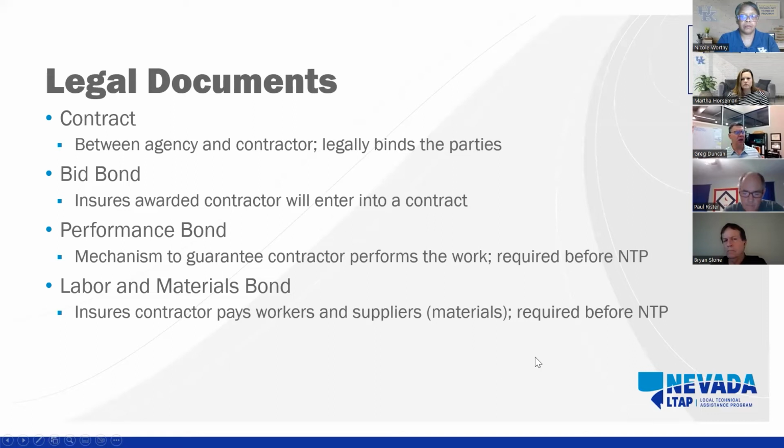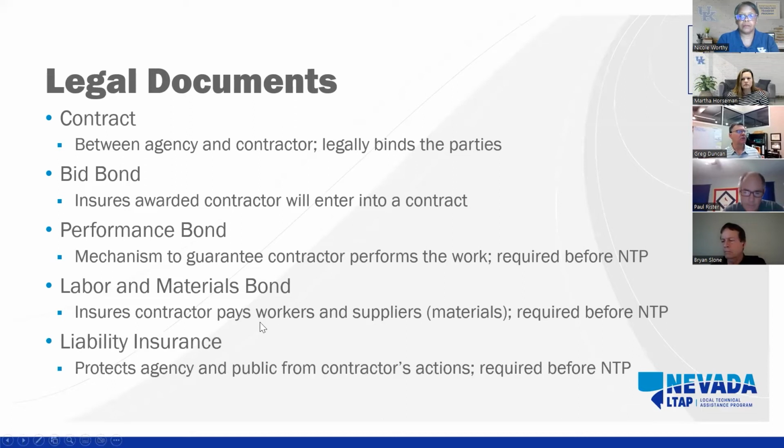contractor pays their subs or suppliers, in order to pass along the payment that the contractor receives from the owner to their subordinates. And there's also liability insurance requirements, so that you want this contractor to be responsible for the things that are being implemented out there. And if there's civil action or something like that that comes against the project, that contractor is insured against it.